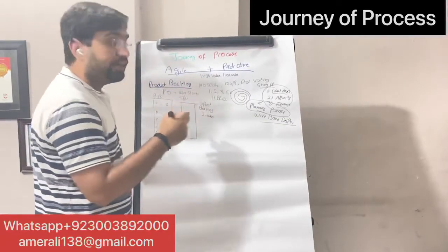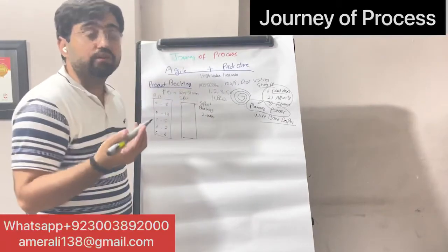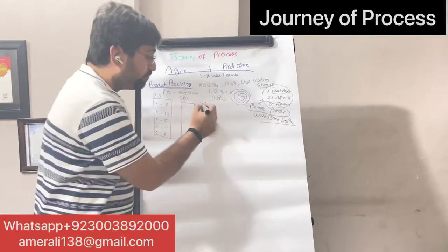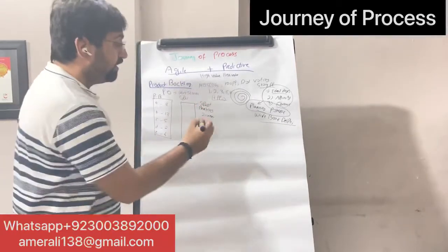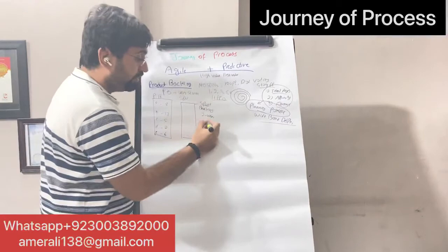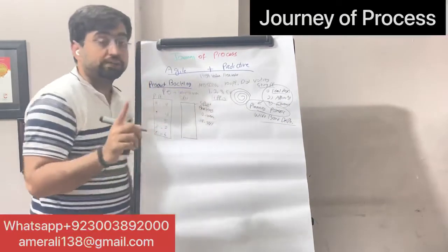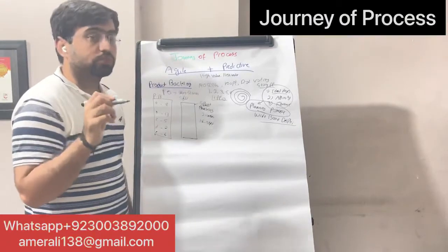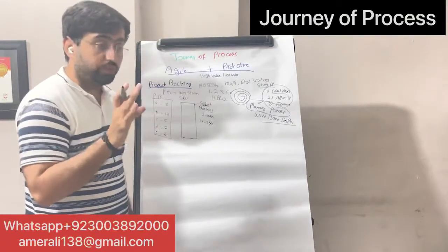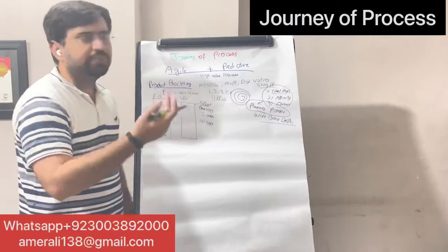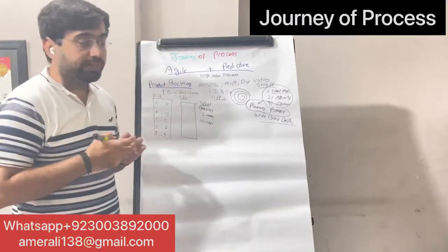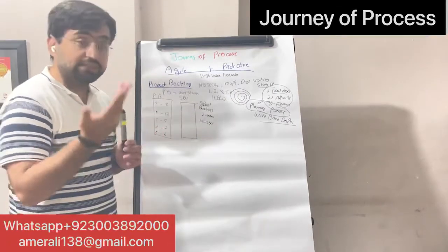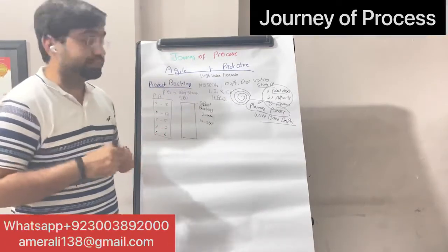They decide what our estimated velocity will be. Velocity is the number of story points you can do in one sprint. So let's say they said our estimated velocity will be 15 story points. Very important thing: it's the team who says how many story points they can do. There can be a discussion with the product owner, but it's the team's decision that is considered final.